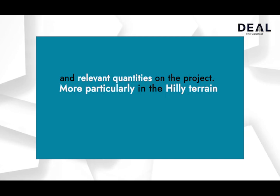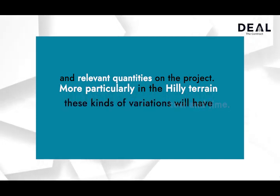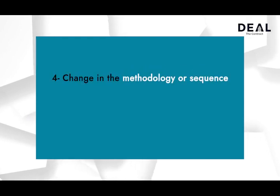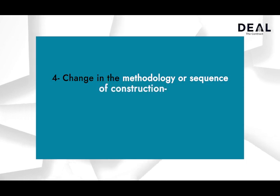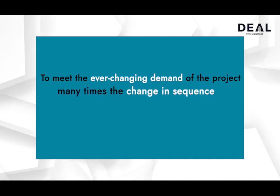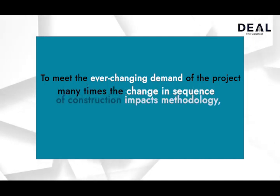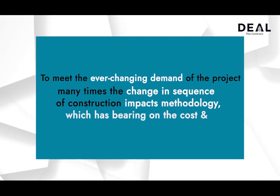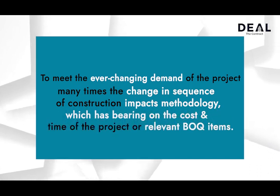More particularly in hilly terrain, these kinds of variations will have a huge impact in terms of cost and time. 4. Change in the methodology or sequence of construction. To meet the ever-changing demand of the project, many times the change in sequence of construction impacts methodology, which has bearing on the cost and time of the project or relevant BOQ items.